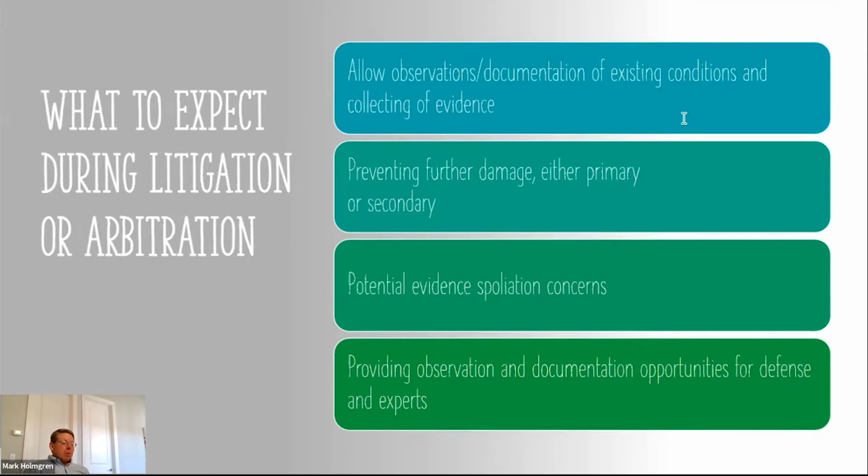Not only that, but where the rules for arbitration are supposed to be more streamlined and efficient and allow for faster resolution than a court case, the way arbitrators often interpret those rules means that those cases often work out just like court cases. The arbitrator is probably going to be a lawyer, and he's probably used to doing things in court. And sometimes they want their arbitration case to look just like a court case. So instead of having limited discovery, where maybe you only do 2 or 3 depositions, the arbitrator might allow parties to do all the depositions they want.